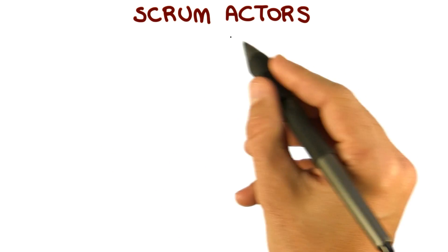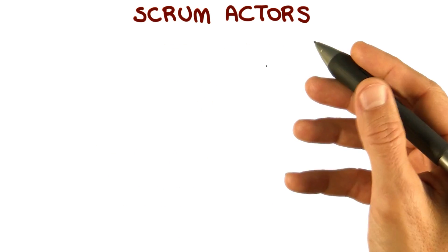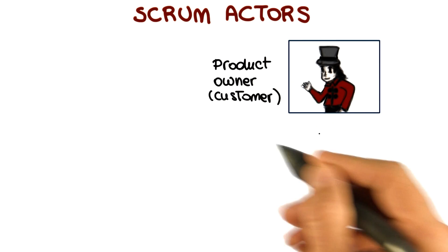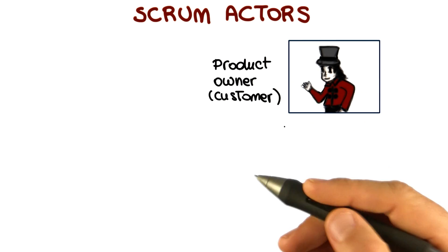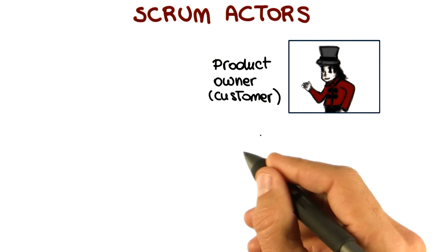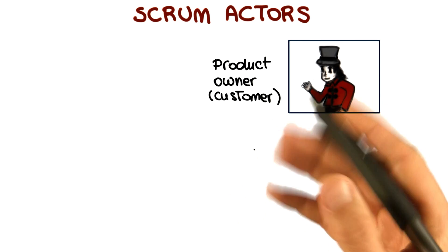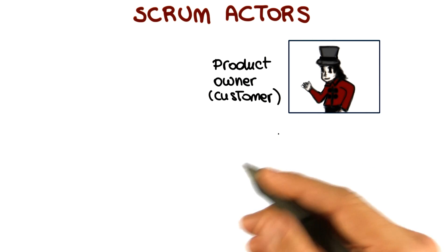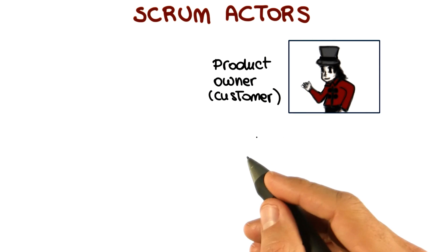I'm going to start by discussing who the Scrum actors are. There are three main kinds of actors. The first one is the product owner, which means the customer. The product owner is mainly responsible for the product backlog, where the product backlog is basically the list of things that have to be done for the project. That is analogous to the user stories to be realized in XP that we just saw.